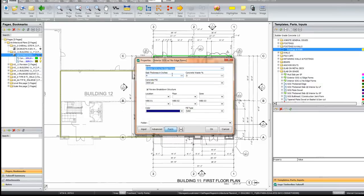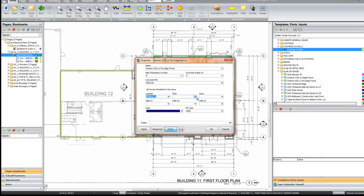The questions will be slightly different. Subject by subject by subject. In this case we will say we want a 5 inch slab. Here is our concrete PSI. The breakouts are going to be filled in again. This time we are at 01 slab on grade. We have straight time.